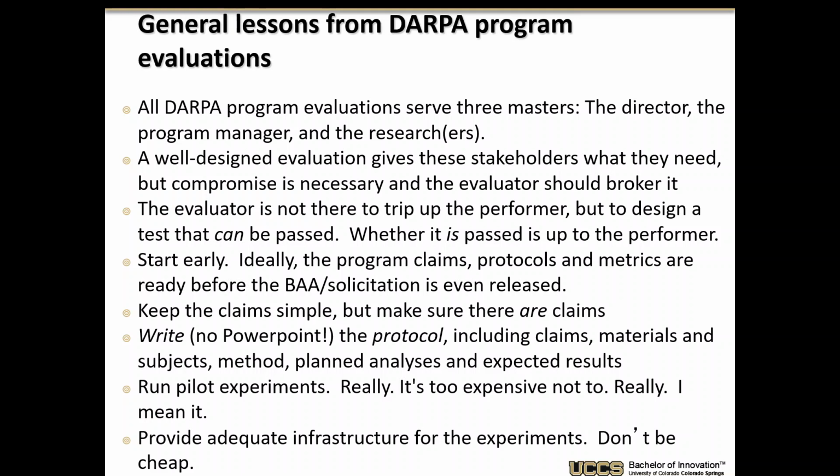It is recommended that you write the protocol, including the claims, material, subject, methods. Write this out literally as though you were almost writing a paper. Here's the research protocol, here's the data, whatever, not just PowerPoint. This is problematic because when you have a high-level, vague description of what you think the program is going to do, you sometimes miss lots of important details that make the difference between being doable and not being doable. Even if you write it out, it's easy to miss stuff. But if you try to do it in 3 or 4 PowerPoint slides, you're almost surely going to miss something.